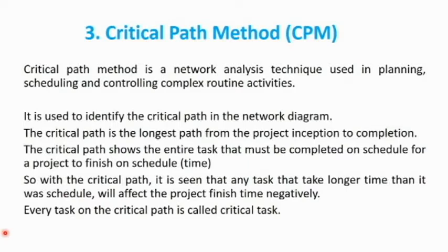The critical path is also the longest path from the project inception to completion. The critical path shows all the tasks that must be completed on schedule for a project to finish on schedule.